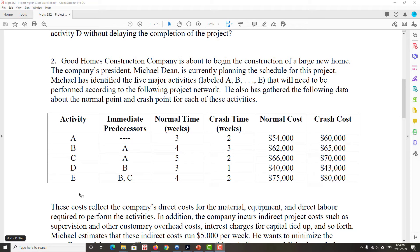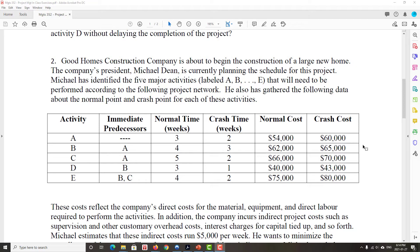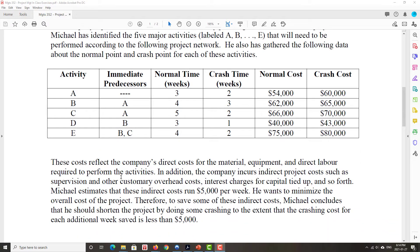We won't worry about what exactly they specifically are, but let's say we have five activities with relationships, a normal time, a crash time, normal cost, crash cost, all the elements that are necessary to draw out this project and see how much it costs and ways that we could possibly reduce the time of the project and even reduce the cost of the project. So the costs for each activity here, we see them listed in the table, reflect direct costs. There are also about $5,000 a week in indirect costs so that for every week that we reduce the project duration by, we save $5,000.